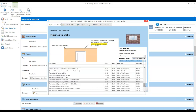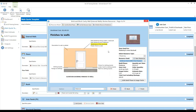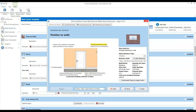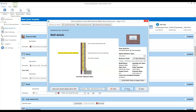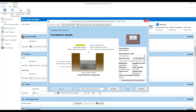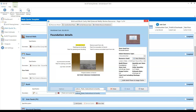When you click in that dropdown box, it's simply showing you the relevant section of the price book — we'll come back to the price book in more detail during the next session. From the resources wizard you can review the resources being used, the costs and quantities. The dropdown at the bottom also allows you to swap and review the labour, plant and so on. You can see that we've got two plasterers and a mate applying the plaster, and a decorator doing the decoration. If I go back to the first screen foundation details, we can see what's been used to excavate the trench and what plant has been used. You can switch between material and other resource types using that dropdown. I'm going to close that down for now. Once you have satisfied yourself that the dimensions are correct...